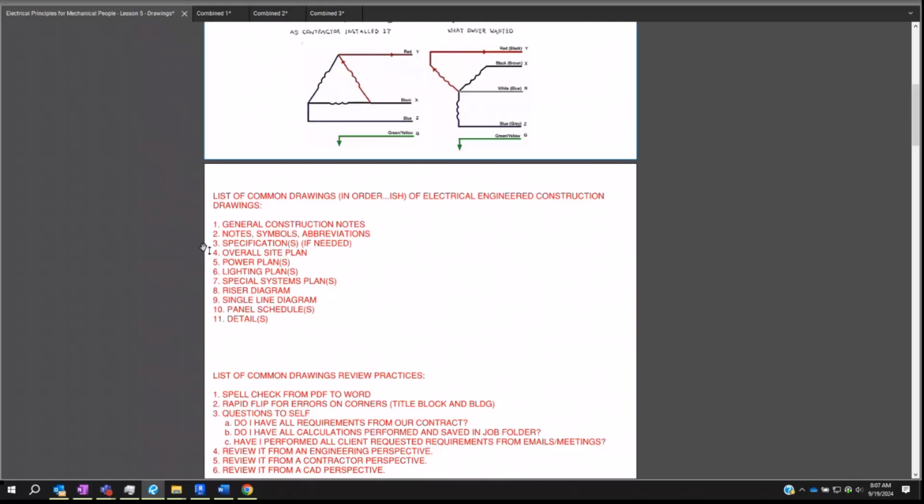And personally, I prefer when clients have their own standard, because what that means is I can copy and paste that PDF, that Word document, whatever, into our specs, whether book or sheet, and say, these are client requirements. My seal is no longer associated with these requirements. So if stupid stuff happens because they required it, it's on them. Now, yes, I will review them. I'll read them to make sure that I'm still meeting code.